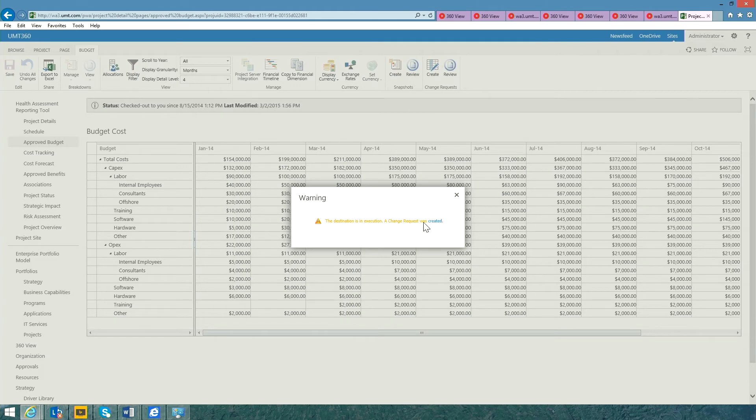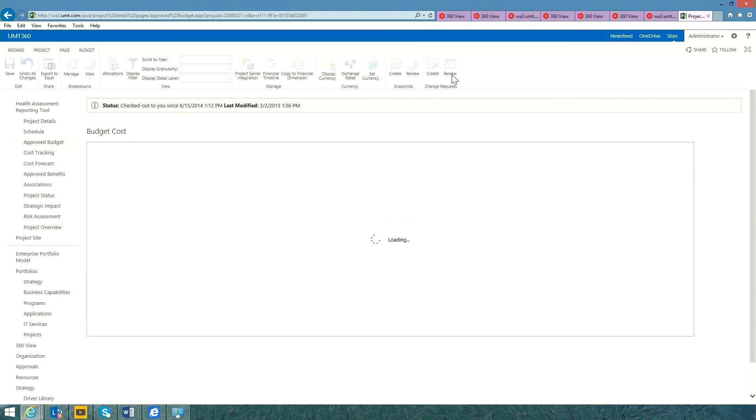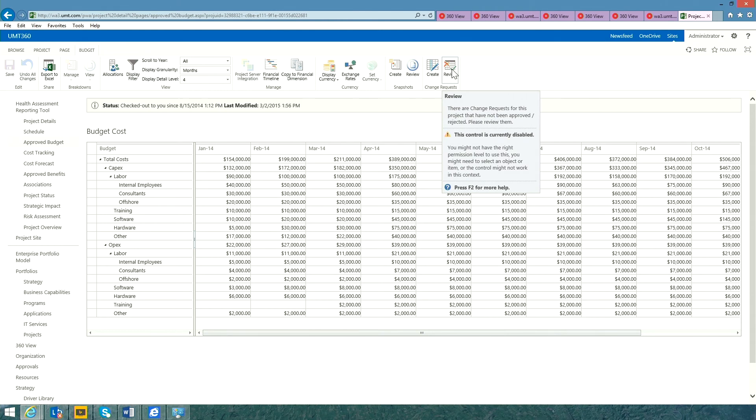Of course, the tool's not going to let you do that. It simply says no, this project is in execution. The budget is locked. I'm going to raise a change request on your behalf and simply going to raise and post a change request in the change request log here.